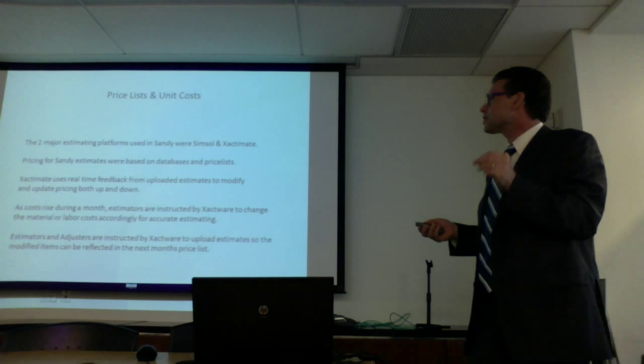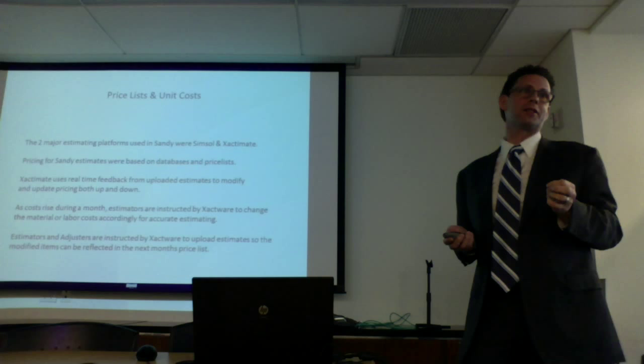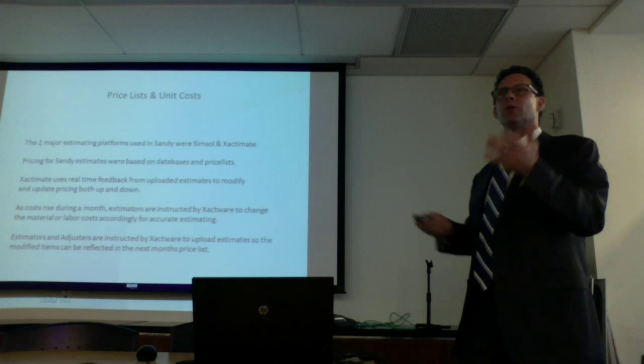Estimators and adjusters are instructed by Xactware to upload their estimates. When they settle a claim, they upload their estimate. It gets uploaded into Xact Analysis, and that affects the next price guide.